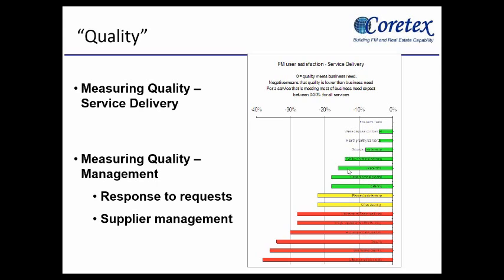The green bits are the ones where we accept, bearing in mind the questioning we do, there is a level of tolerance that should be allowed. So if it's below 20%, then the green meets requirements. That should be an amber, not a yellow. But this bit here would be 20 to 25%. There's a degree of potentially an issue. It's beyond where we'd expect. And then red is the significant issues.